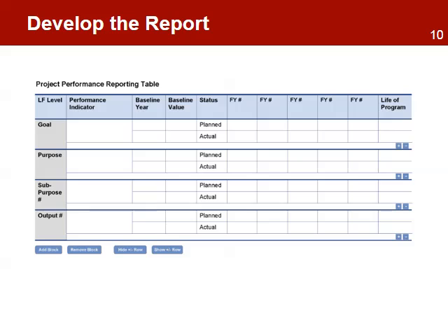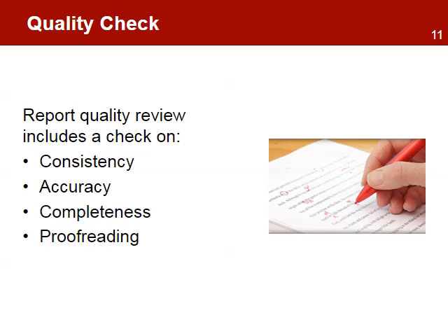In this phase, the project manager and the people to whom he delegates some of the responsibility will develop the various project status reports by following the requirements specified by the organization, the donor, and other key stakeholders that will receive information from the project. The formats can vary from a simple one-page report to complex reports that include detailed information on all aspects of the project. This is where the project manager needs to pay careful attention and ensure the format requirements are understood by those responsible to develop reports. Once the reports are ready, they must be checked for quality before they are distributed.